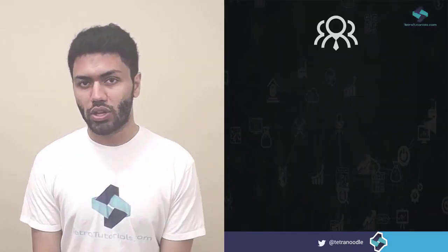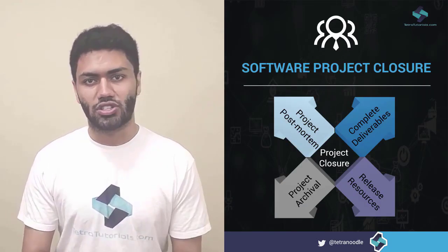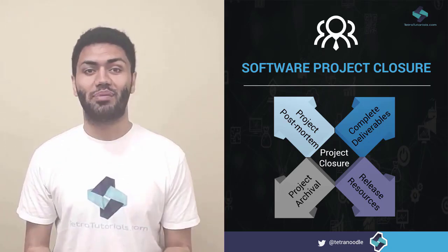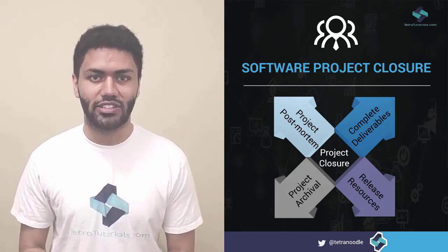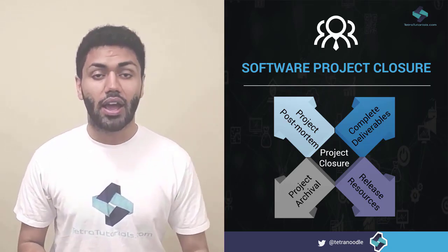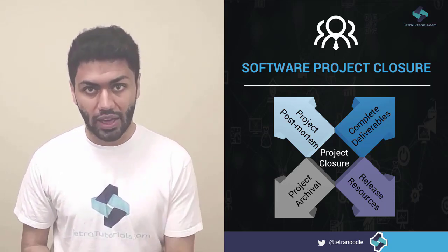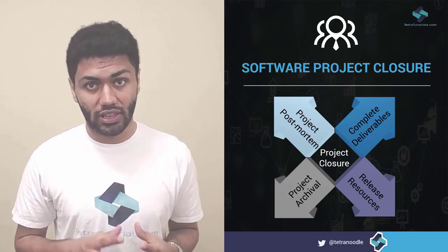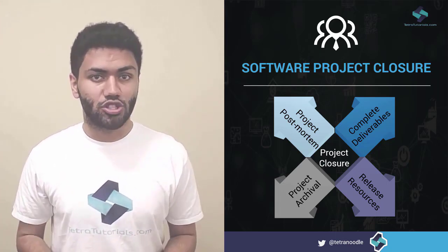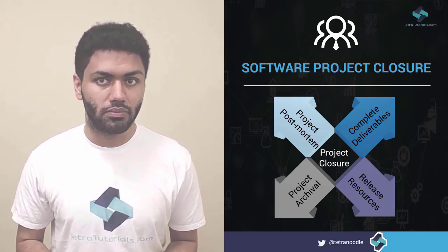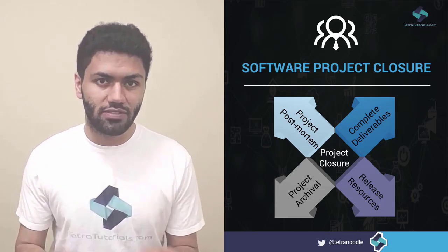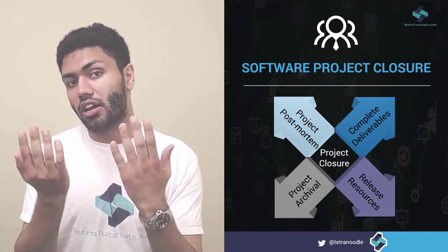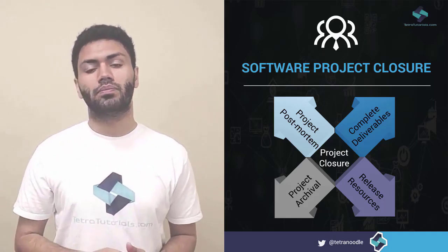As you may have already realized, the project closure has to start when all the project deliverables are complete. So the first step here is to check whether all the committed activities of the project are completed and the deliverables are ready to be handed over to the end users. As project closure is the last phase, ideally nothing should be left out to be implemented. The closure is the final and formal phase, which involves handing over the final tested and approved deliverable.